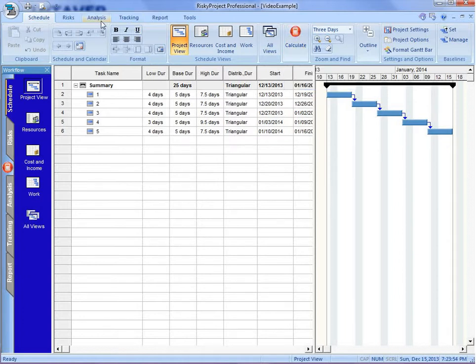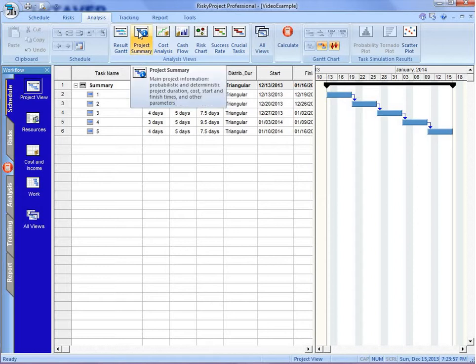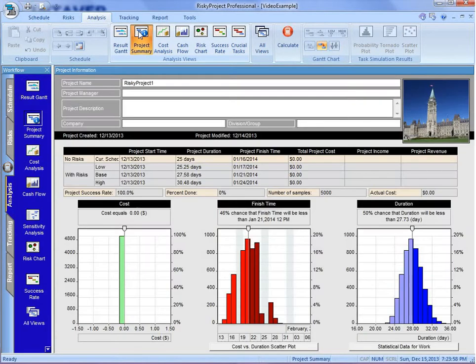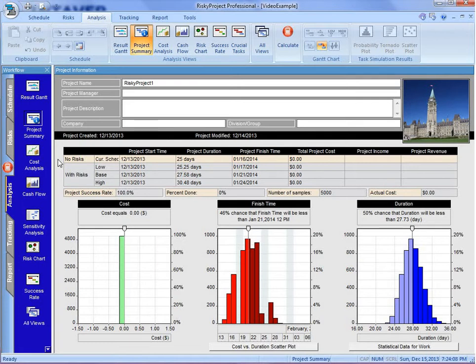At that point, we can go to the Analysis tab, and we're going to look at the Project Summary. Now in the Project Summary, we can take a quick look. And up here, we can see the project with and without risk. Project duration, 25 days without risk.